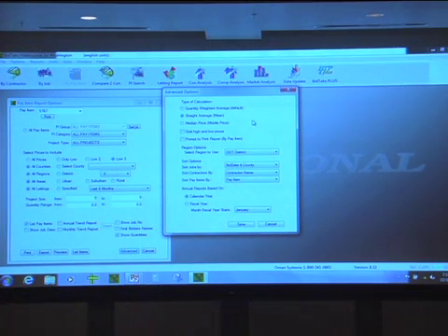I go to this advanced tool, and I think you guys can see this. I have several ways to do my calculations, and I like to use my quantity weighted average, because that's going to weight my results more by the quantities. It's not going to let the small jobs influence the prices more than they should. When you use the straight average, just your cost divided by your jobs, you're letting those small jobs really influence what that cost is going to be.